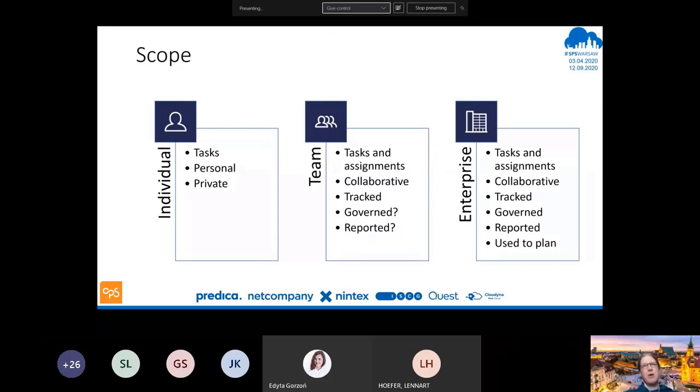So as a team leader, I might say, well, I've got 5 people in my team. I'm allocating tasks to them, but I can see that I have more tasks than I have capacity. So therefore, I might need to hire somebody else. So this is where we start to get into resource management and being able to say, based on the number of tasks, the amount of work, and the amount of people who can deliver that work, I need to hire people, reallocate people, maybe move them around. So that's where the enterprise really uses this information to manage the growth of an organization.